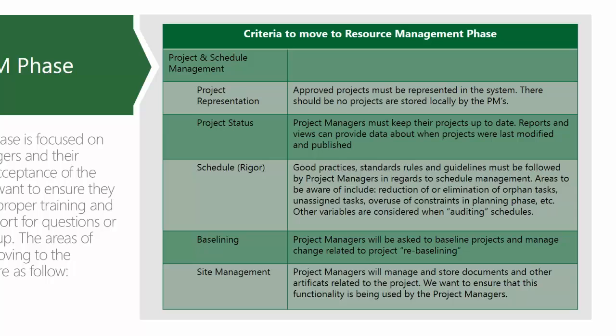We're looking for areas like orphan tasks, tasks that don't have relationships, unassigned tasks, overuse of constraints — these are all areas we'd be reviewing in order to move them into the next phase. So this is a focus on the project managers, making sure they're using the tool properly.